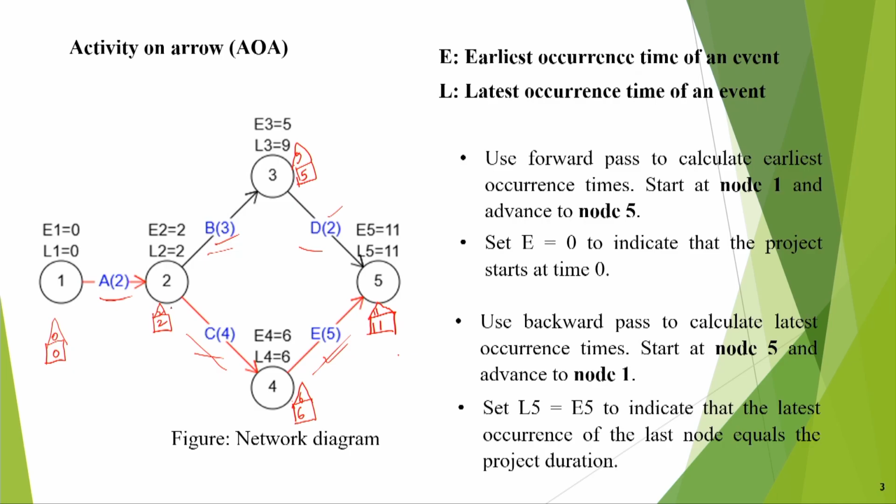I would have seen that when I did 6 minus 4, suddenly I wrote 2, but I could have paid attention to that also anyway. Luckily it is always greater, because suppose this path would have given 1, then we would have to write this one. So we do this type of diagram, okay, as per Taha book convention. Otherwise in other books it is written like L1 means backward pass and E1 means forward pass. Okay, here that rectangular or square indicates forward pass and triangle indicates backward pass.